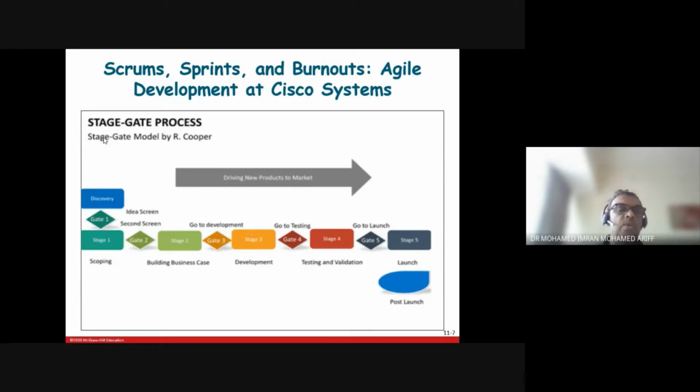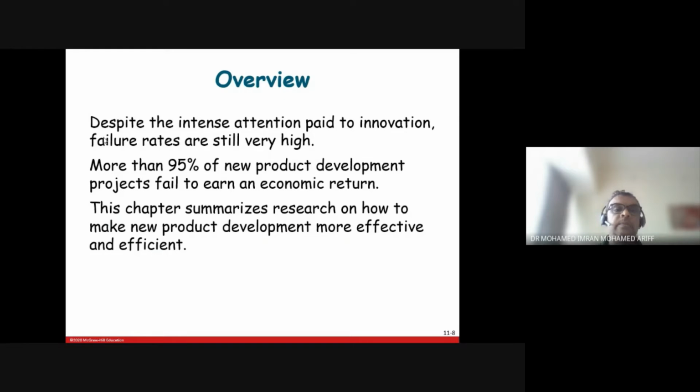Okay. So if the process is not completed in this stage, then it will be redone, and completed. Only then it can move to the next stage. So the gate is like a gatekeeper to determine if that particular phase is complete or is done. Only then it moves on to the next particular phase. All right.